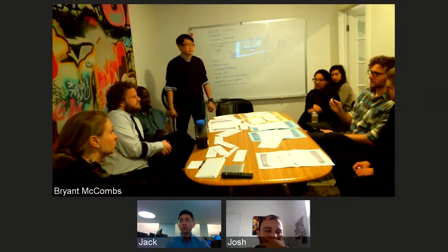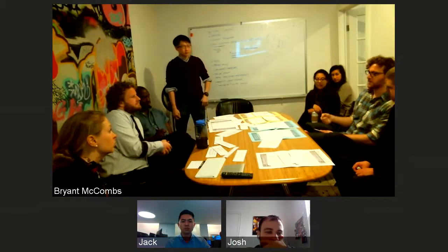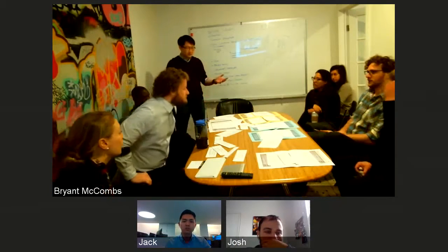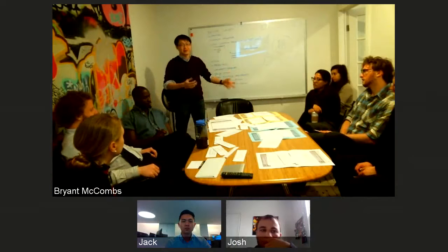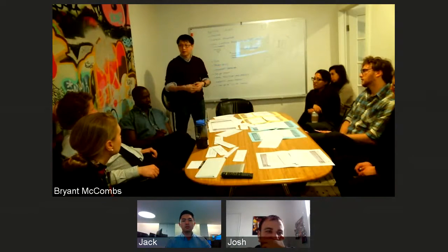But then that happens every morning, and all of a sudden I've done 5 times the amount of cards in an engagement than I originally had. Right. And this doesn't stop them from writing any cards, but it doesn't make it onto the plan unless it fits, and it doesn't get on the plan unless it's estimated.